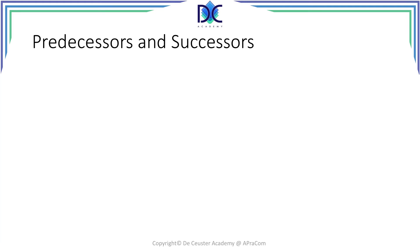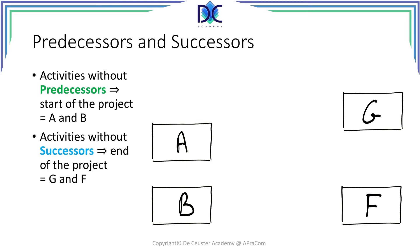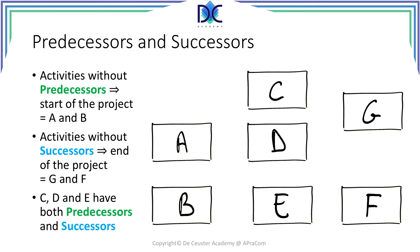Let's look a little bit closer at predecessors and successors. Let's consider two activities A and B that have no predecessors — it means that A and B can be at the beginning of the project. On the other hand we can identify activities that have no successors, like tasks G and F. We also have intermediate activities like C, D, and E, and these activities have predecessors and successors. What we now have to do is link those different activities by looking at the precedences of tasks C, D, E, G, and F.